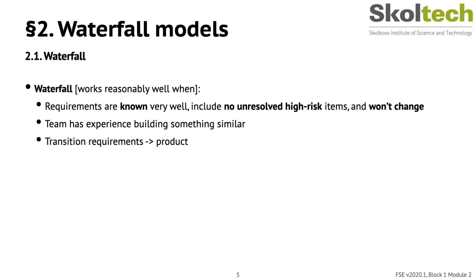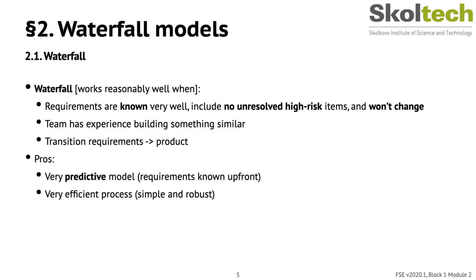And also, you have to have enough time to do everything sequentially, meaning that the customer is okay to wait until the full application is delivered. Of course, Waterfall is a very predictive model in terms of what we have been discussing previously, meaning that the requirements, you have to know them upfront, but it's also a very efficient process because it's simple and robust.